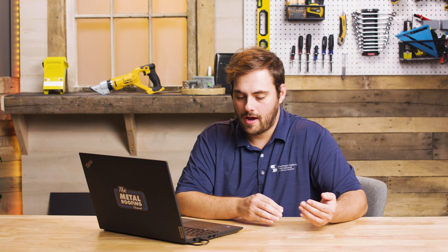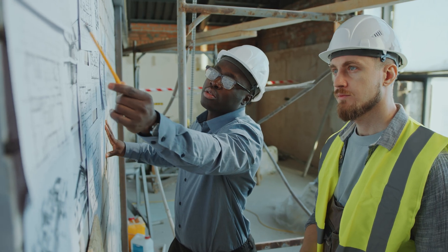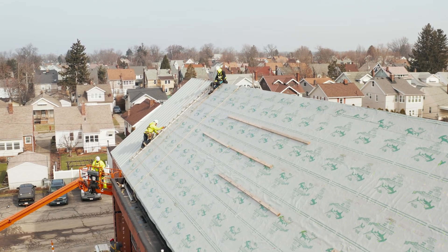When a commercial contractor makes a bid and it's accepted, that dollar amount is what they get paid — though not necessarily, because change orders can come up mid-project. They might encounter unforeseen conditions once actually on the project that require changes, leading to a discussion between the roofing contractor and the GC. The submittal covers material costs, labor, installation costs, travel, and any number of other things — once submitted, that essentially becomes the budget for the project.